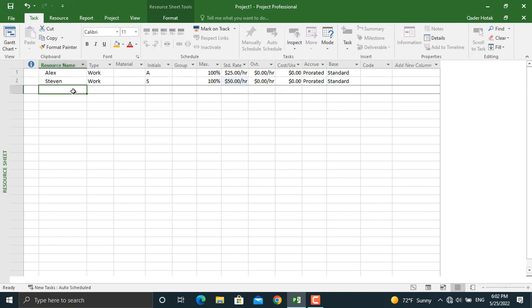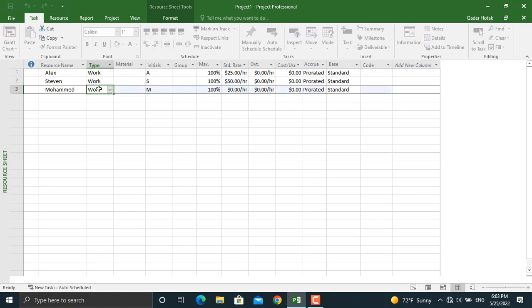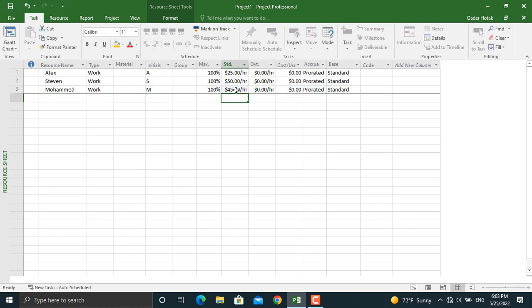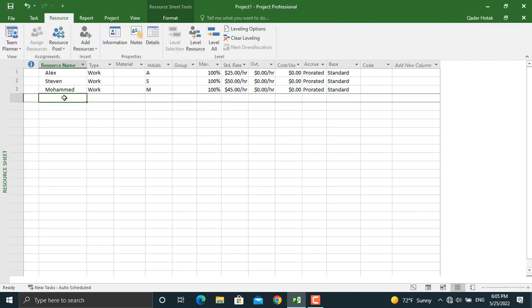Our next human resource will be Mohammed. Mohammed will be working with us on this project as well, and we will assign a standard rate for Mohammed of $45 per hour.